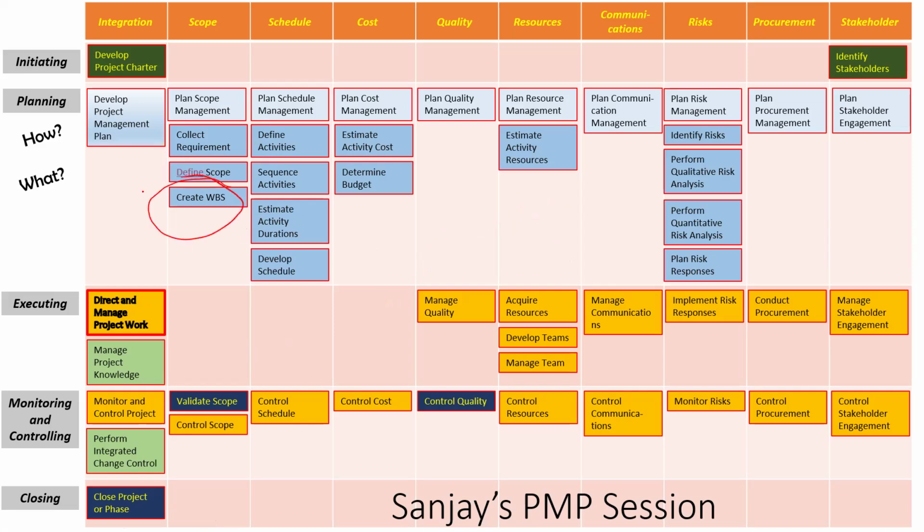Breaking the scope into work packages is create WBS, because then each work package could be assigned to an individual.